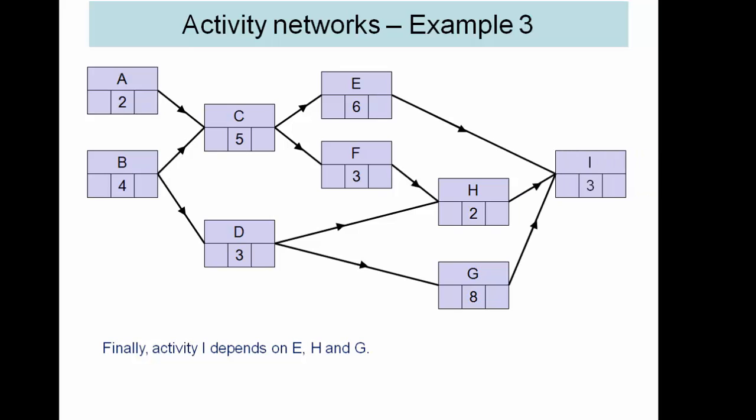You'll notice for this network we don't need a special connection end node or end activity, as we've got I as the final activity. We don't have more than one activity at the end.